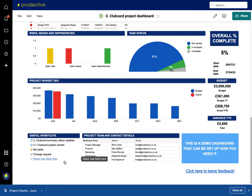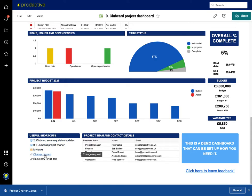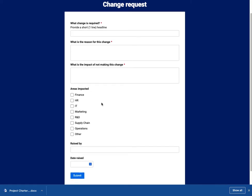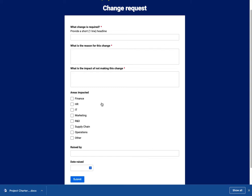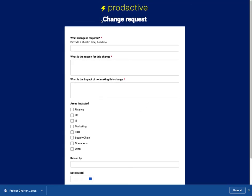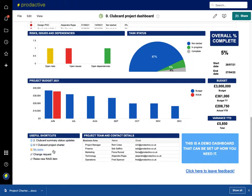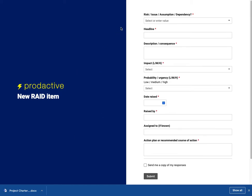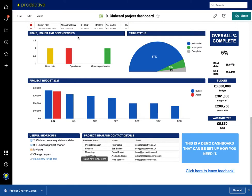In this case I've got the shortcuts here so I can go in and open a change request. For this project I can launch a change request which will go into a central area for the changes requested on this project. I can also raise a new RAID item, so if I want to raise a risk, issue, assumption, or dependency, I can add that in and this will go through and be consolidated within the project in that single view as well.